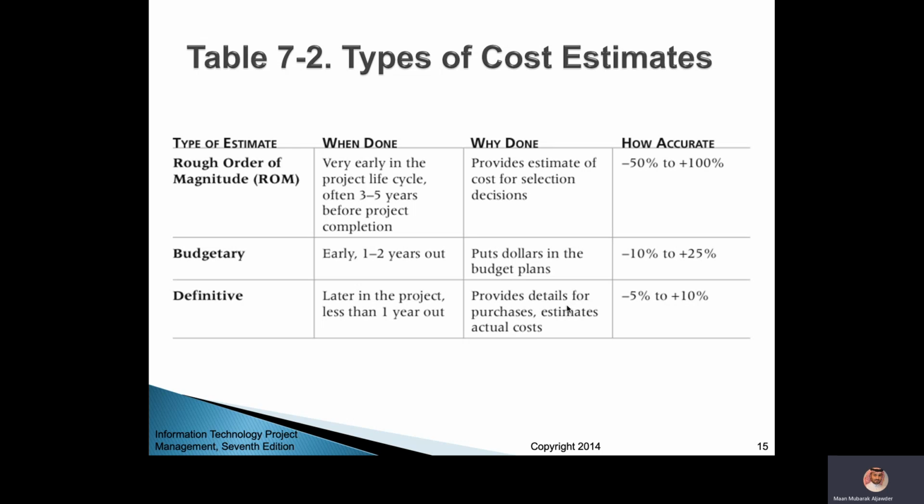Okay, these quotations have some figures, and they implement the three quotations. So you ask for 3 quotations instead of 1, and then when you budget, you take the average.